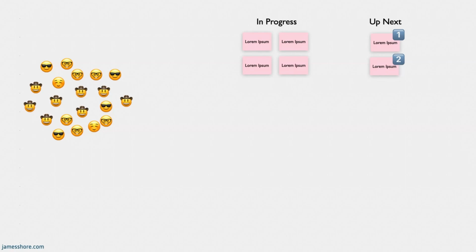The meeting starts with announcements, and then team leaders from the previous cycle, which are called team stewards, describe what their teams have completed since the last FAST meeting, 2 to 3 days ago. Next, product leaders describe their business priorities. On your whiteboard, you'll have a set of high-level priorities. You can see them in the upper right here.